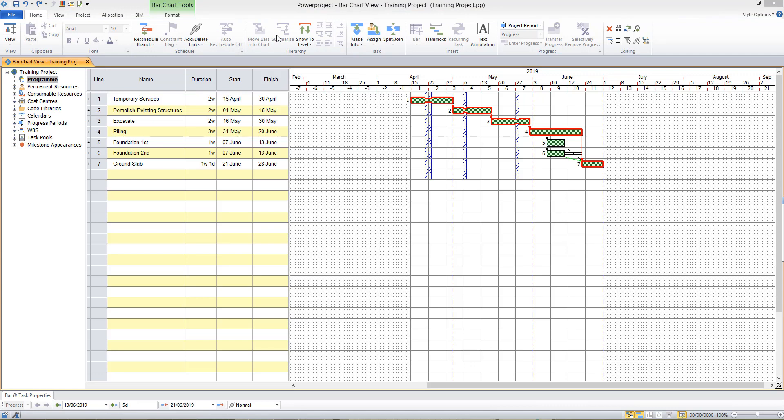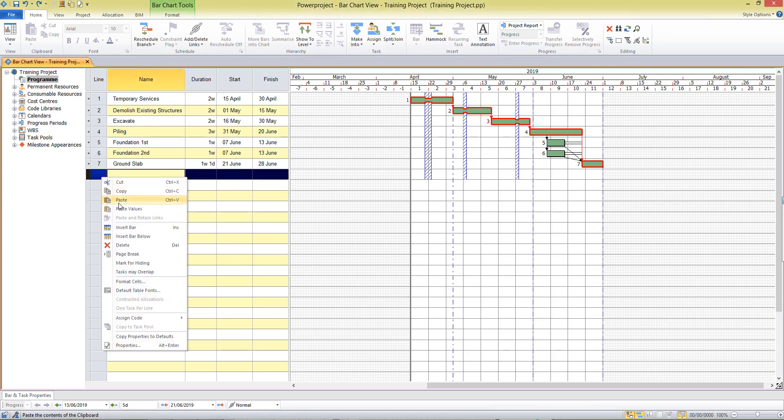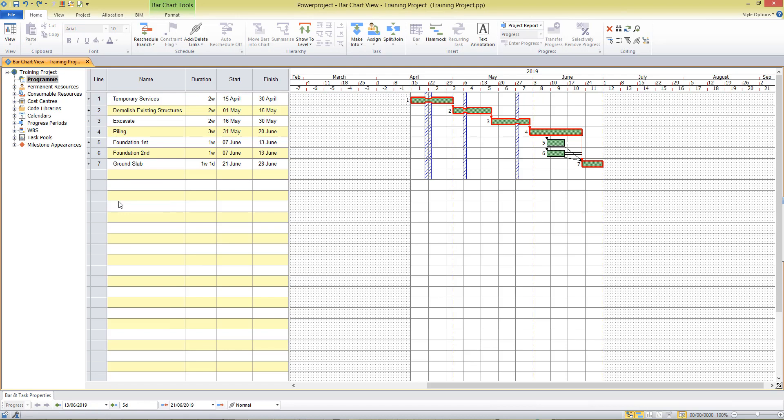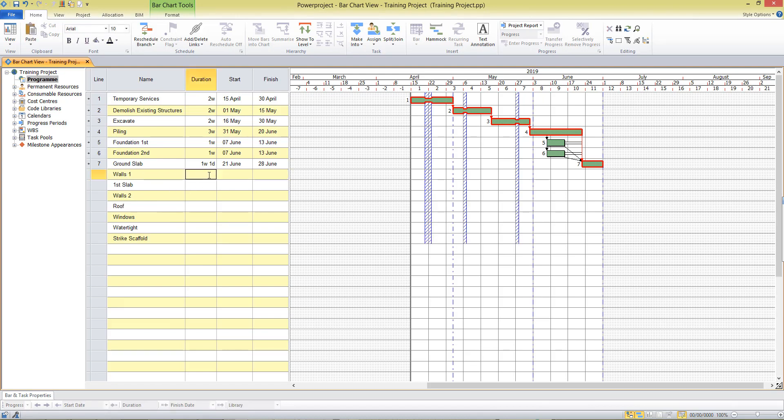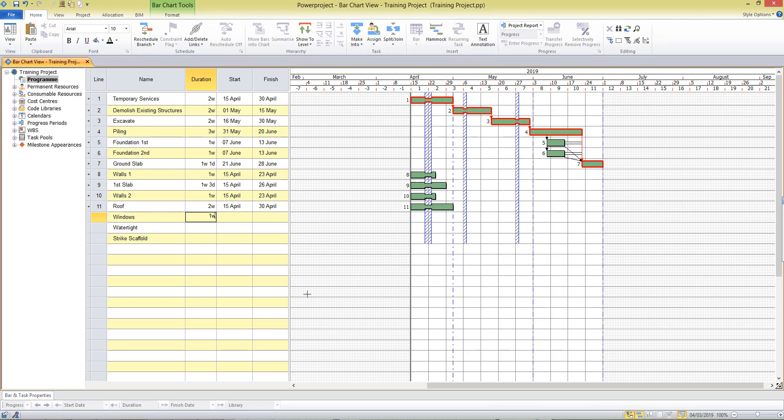We'll now type in some additional tasks into our project and plan the durations for these. So I'm estimating a week there. If I enter eight days notice that in the table it will round up to one week and three days. So enter in durations in daily or weekly units and when it comes down to water tight and strike scaffold they are going to be milestones so I enter a zero duration. Now to link these tasks to the existing tasks.